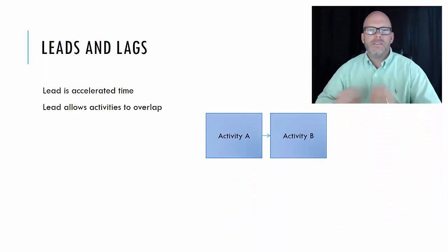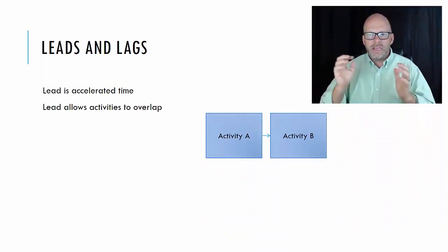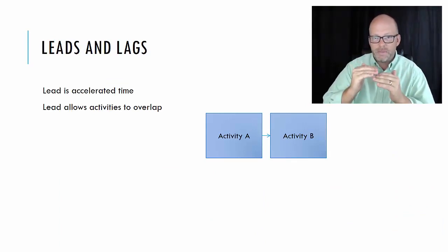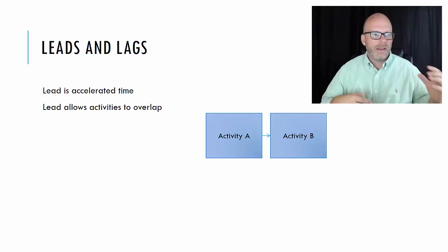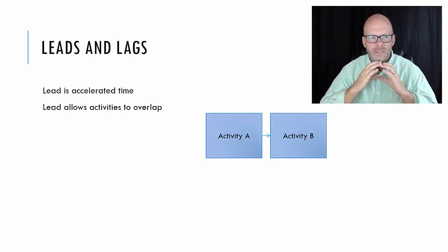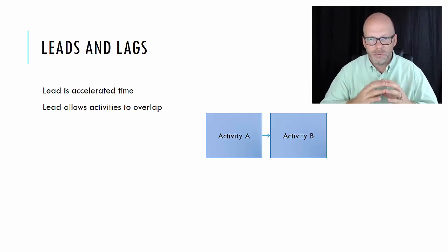Lead time is accelerated time. Lead time really brings activities closer together, maybe even overlapping. So with lead time, activity A and activity B, you bring those activities together. You might even allow them to overlap.